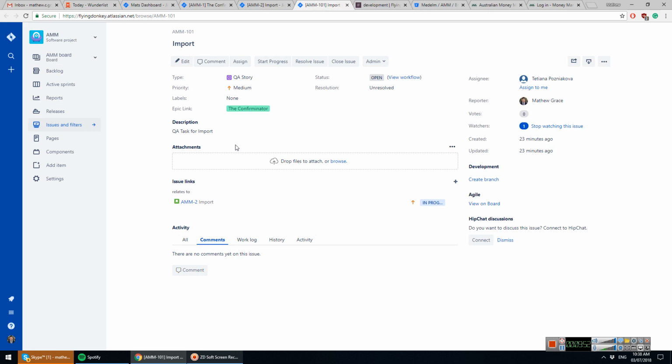To say what we're testing for and how that's going to work, and then the testing guys should automate these tests. So the idea being we have a set of unit tests on every branch, and then we have a set of functional automated tests that run, which means that over time our unit tests are going to build up, and our functional automated tests will build up, and we'll get good test coverage across our piece.